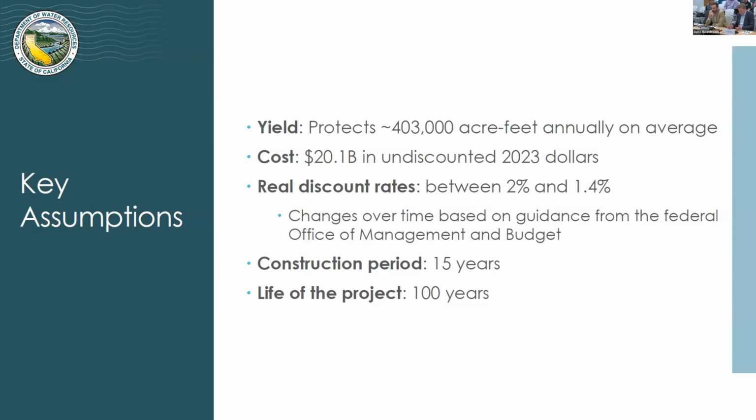But with respect to the benefit cost ratio itself, for a project of this size, it would be dicey to invest in it if you had a ratio of 1.05, something like that. That's just too close for a multi-billion-dollar investment. So you'd like to see 1.5 or greater, I think, would be typical guidance. So the fact that it's over 2 here can account for a lot of contingencies that are difficult to foresee now, ones that were both for the project and against it. So I think that should increase confidence that ex post, this would be an investment that you're glad you made when you look back on it.